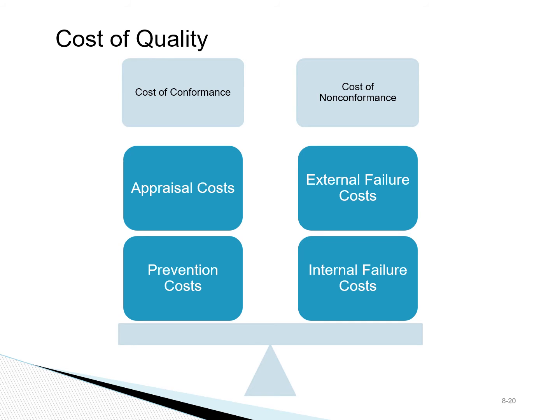That is, whatever we do to meet the project requirements, such as testing or improving the software development process by, say, instituting a peer review process among programmers. The other costs are associated with non-conformance to requirements, such as dealing with downtime costs of the system or impact on reputation of the organization that developed the system. So Crosby's point is that we are better off to spend money on conforming to requirements rather than dealing with non-conformance issues when the product is released.